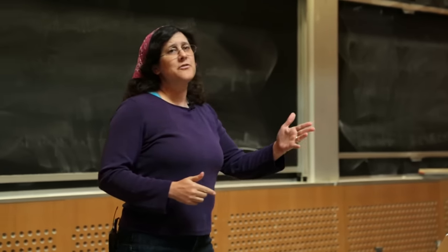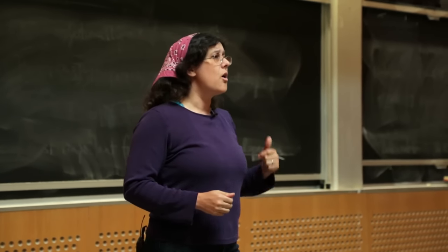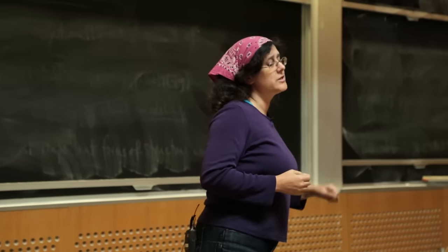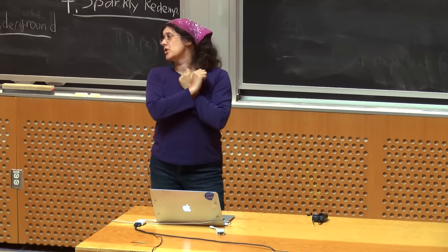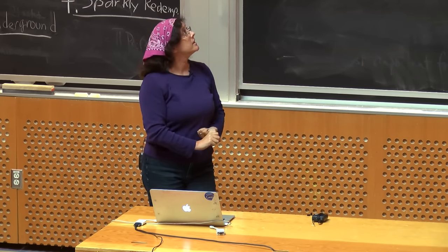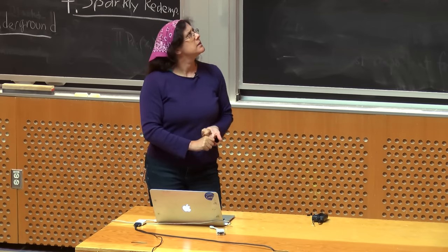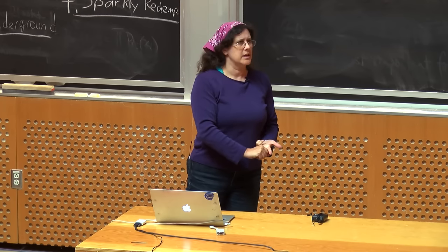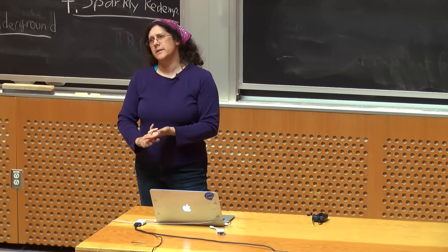For teams your size, 5 to 6 minutes is probably enough because all each person has to do is stand up and answer these three questions. What did you do yesterday or since our last meeting? So what have you gotten done? What are you going to do today? What's on your task list? And finally, what is keeping you from getting things done? What's blocking you? How come you can't get things done?